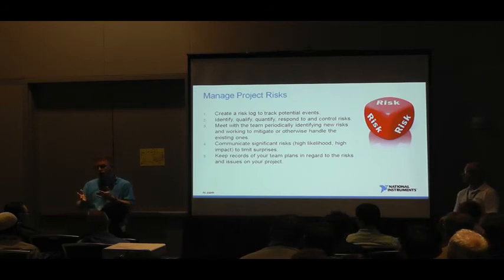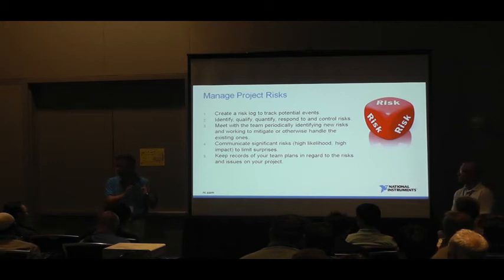So you negotiate with the customer and you say, we know this could be risky. How about we do a little discovery phase project, little fixed price deal to find out how we can do that.